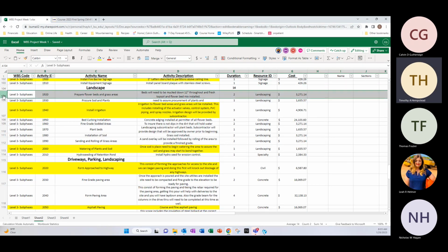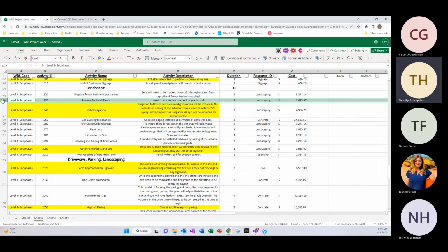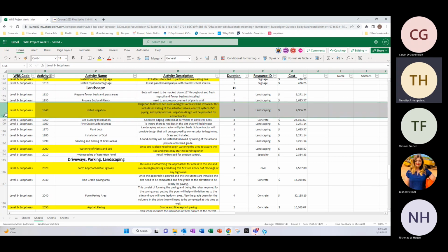Hey, thanks, Nick. So first, preparing flower beds, we're looking at 2 days, and that's going to be using our landscaping resources, and it's around $3,000. Next, we're going to procure sods and plants. That should take a day using our landscaping, around $1,600. And then we'll move on to installing irrigation. That's a 3-day activity using landscaping, about $5,000.